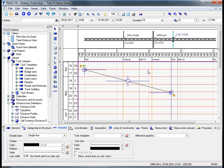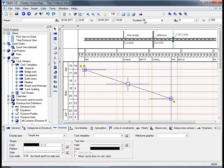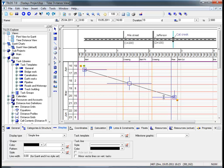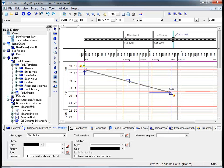Once you have drawn your task in the main working area, TILUS allows you to change the data in two different ways. The first way is by changing the information in the preset toolbar at the top of your screen - for example, duration may change to 20 days and the length may change to 2800 meters. The amendments made are automatically adopted graphically. The other way is by grabbing the edit lines and changing the duration and reducing the length of the task accordingly.